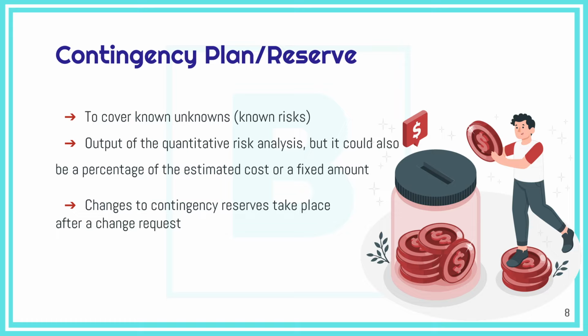And we linked this with slide 88 of our training presentation, in which it was explained how to calculate the project budget. And we explained that this contingency reserve is calculated through the advanced or quantitative risk analysis, which you will see later. And it is used to cover for the known risks in case they materialize.